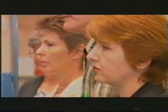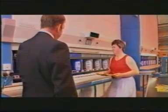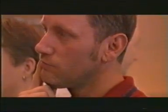There was no upset. We had to cleverly plan how we were going to pack magazines and build the equipment at the same time, and at night we still had to pack newspapers. But we were able to bring it in, bolt it to the floor, work around it, and we now have a very, very robust system. Just 8 working days after the end frames for the 4 carousels were unloaded, training starts. The system has been so well thought out that the operators very quickly get to grips with it.